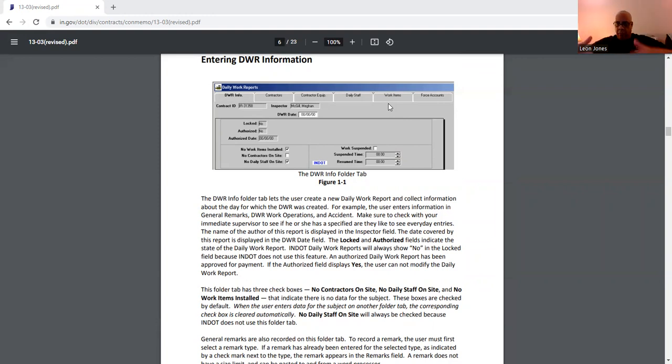And then from the change order specialist, if something is wrong, they disapprove it, send it right back down to you, correct it. Now, if it's good, then it would go up to, let's say, your AE. I know in Pennsylvania, we had a workflow. It went up to our ACE, which is just like an AE, and then it would go up to our ADE, which was the assistant district executive.